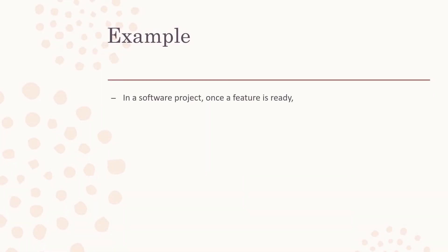From an example perspective, let's talk about a software project. You're working on a software project that has several features. When a feature is ready, as a project manager you ask the development team to take that feature to the testing team and perform testing. The quality or testing team performing that testing is basically verification — they are checking whether the code has quality and follows organizational standards and regulations.